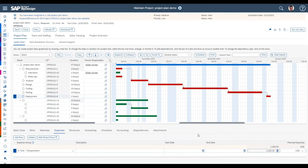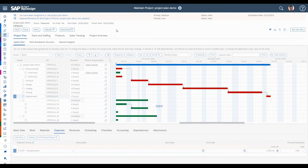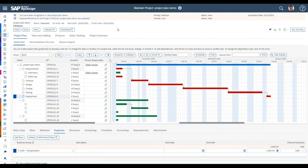One key thing to understand about the Expenses tab: this is all from a planning perspective — these are planned expenses. Where this comes into play is in reporting: you compare actual expense reports or actual supplier expenses against the planned values set at the outset. These rows don't create any transactions in the system. I'll save these changes now and then switch over to revenue planning, which is the last element we'll cover before finishing the demonstration.